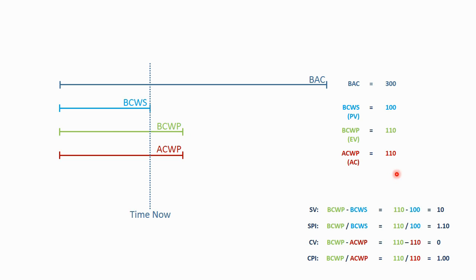So yeah, if you're ahead of schedule, you very likely are going to be overrunning and running a little bit hot. Now, maybe that's a problem. Maybe there was only 100 hours available in this period. But if the funding is somewhat flexible, you want this person to stay ahead of schedule. They're staying ahead of schedule and they're getting the work done for the budgeted amount. So if you've got the 110 hours to pay people, this is actually a good thing. And the earned value metrics show you that you're not overrunning, you're actually on track and ahead of schedule.